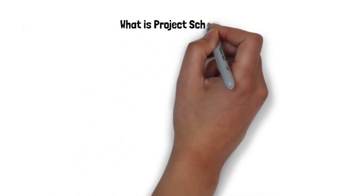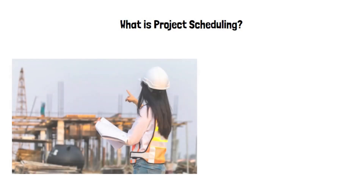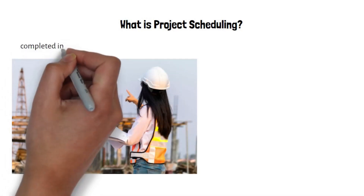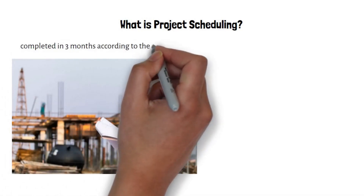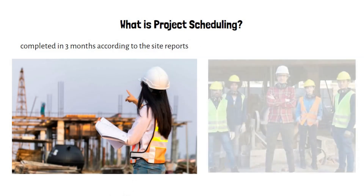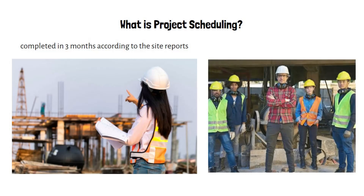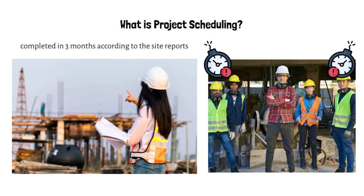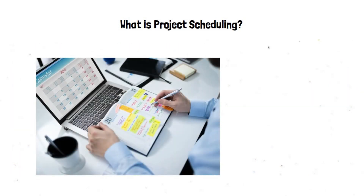For example, let's say your construction project will be completed in three months according to the site reports — is this enough information regarding the performance of your project? If your schedule baseline shows a two-month completion, you can notice a delay and motivate your team members to take action in order to catch up with the deadline. Many organizations and project teams across all industries have different approaches to building workable schedules.